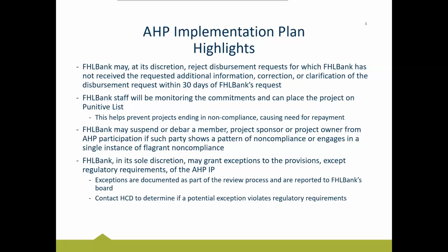Also, the bank holds the discretion to grant exceptions to certain provisions in the implementation plan. Like I mentioned, these are highlights from that document. It's going to have all those rules and policies. We might be able to provide exceptions to certain provisions, but if you know that you are violating a certain provision, we ask that you please provide us that information prior to spending any money, prior to doing your rehabilitation work, because if it's something we can't provide an exception around, then unfortunately you would be out that money if you did spend it already. So that's just something to know.